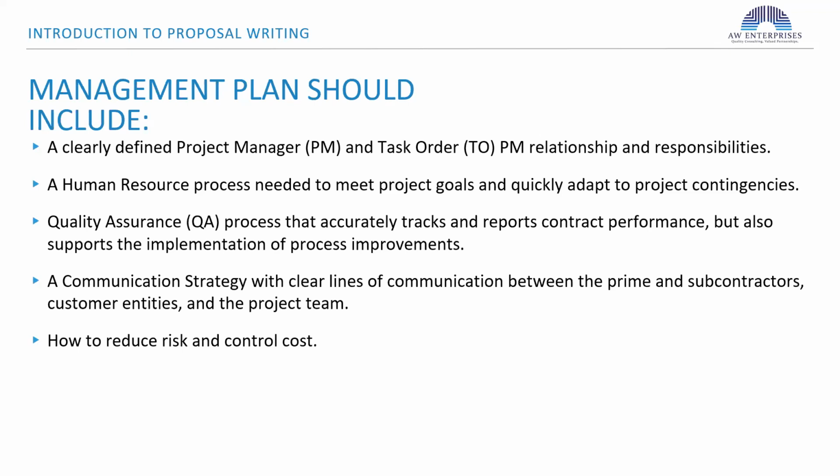How to reduce risk. In each type of contract, there's some risk that you're taking. I mentioned firm fixed price contracts. The federal government issues a lot of firm fixed price contracts, including the state of Maryland. And in these type of contracts, the risk is on the contractor.